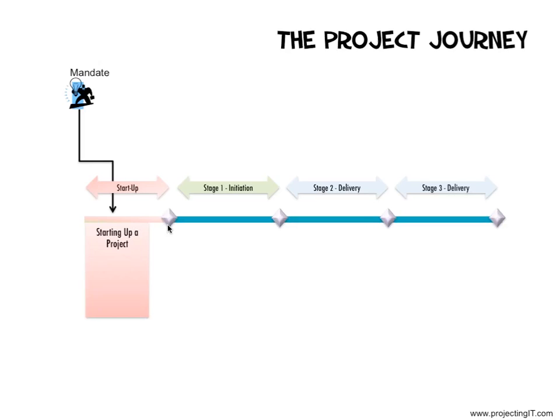The project board, which is a group that looks at the project status and makes decisions about the project. Then we have the team manager who delivers the products. So we have another process to define how the team manager receives work from the project manager and delivers product to the project manager. And all other 5 processes are for the project manager. In the first process, that is starting up a project, the project manager and the key roles in the PRINCE2 project management team are appointed.